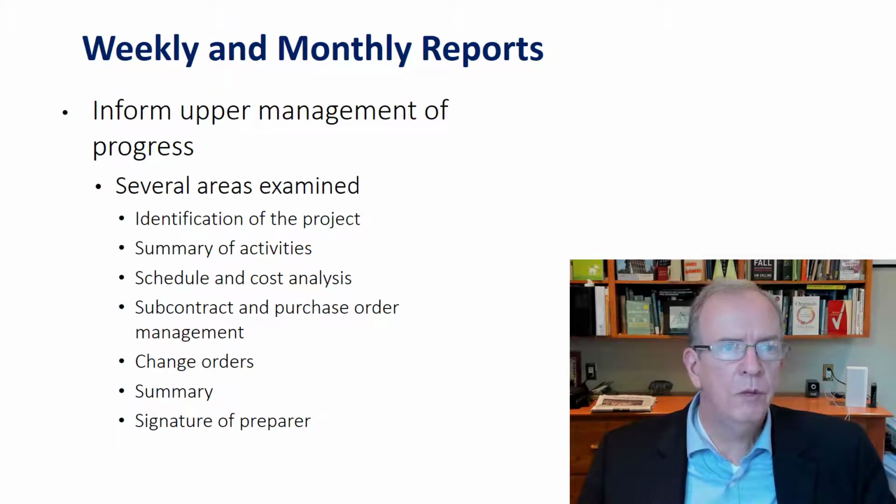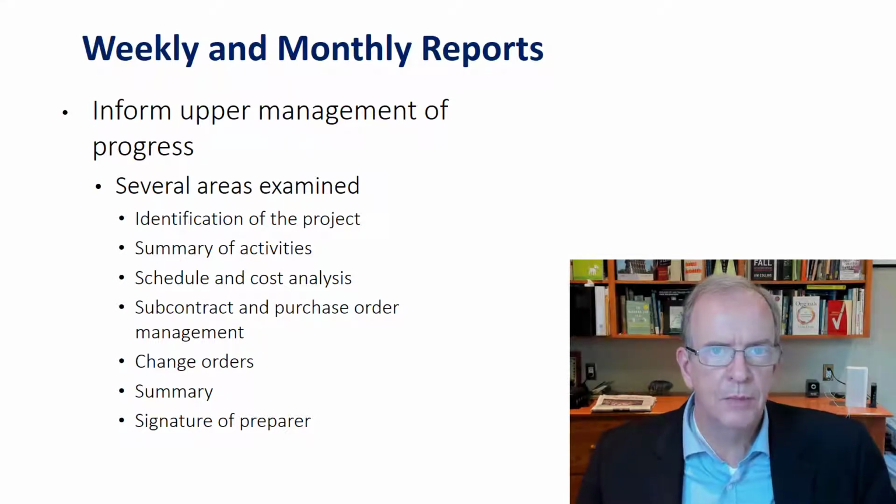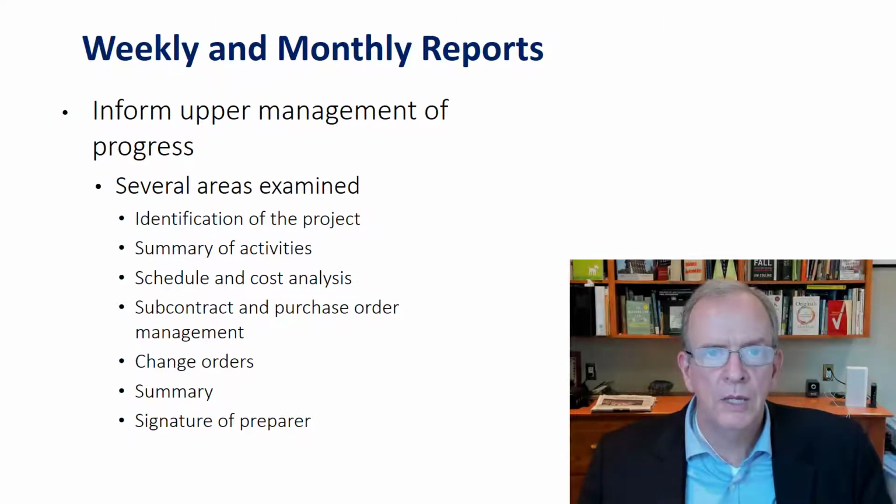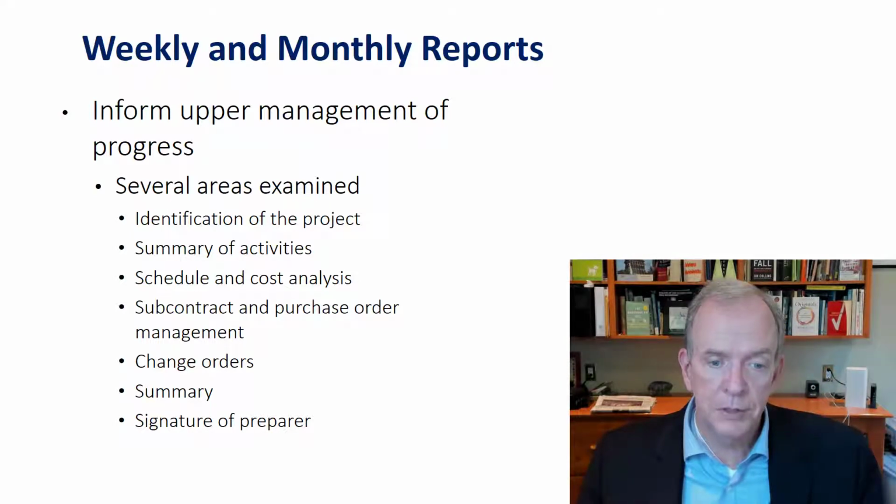Weekly and monthly reports. Very often companies may internally do weekly reports, but externally do monthly reports. Sometimes it could be weekly, sometimes it can be bi-weekly. Sometimes you have to look at what the contract says about this. If it's weekly reports, then that's what you've got to do. Monthly reports are very, very common in the Canadian construction industry.